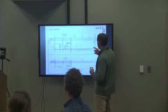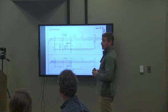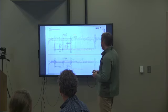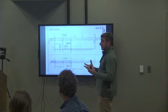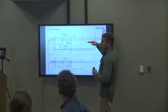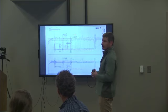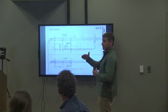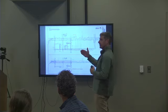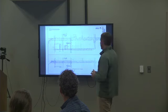As we got into it, a portion from Montgomery back to Jackson, we determined had already been upgraded. So we pulled that out of the project. No need to replace a pipe that's relatively new and sufficient in capacity. The other piece, while I've got this up, we did some preliminary planning, some modeling. The existing water mains, there were 2 running down Main Street, 2 in Lambkin. And we were able to model that condition with the demands that Edward was talking about, future demands, and consolidate that into 1 main replacement that could meet that need. So we're not going back and replacing in kind, we're replacing with 1 main that's sufficient to carry that and meet that demand capacity.